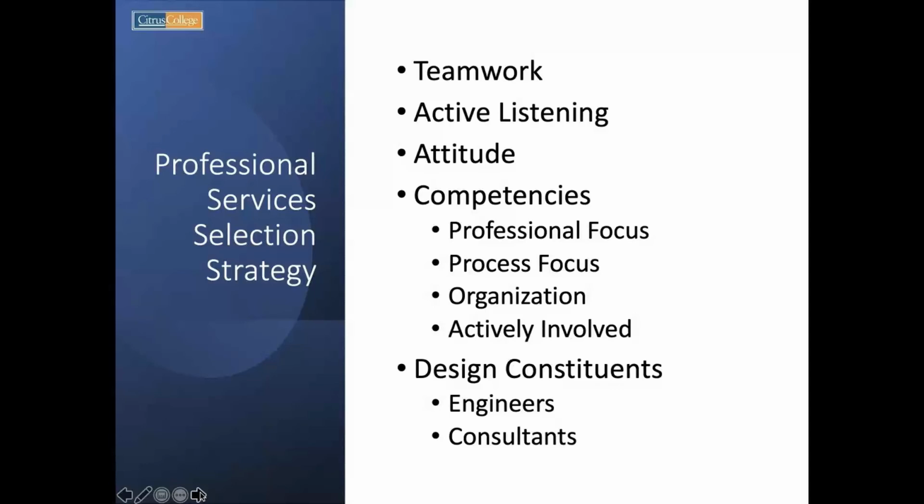If you see a district that has a bunch that are not closed out, then what that really tells you is that the 2 primary stakeholders, one being the district and 2 being the design team, didn't follow through with closing out that project, and that makes both of them look bad.